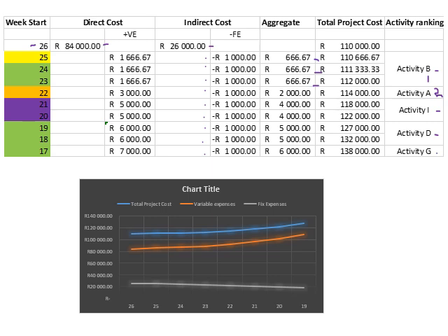You can do it on the project cost as well, to see what the cost implication on that is. It's exactly the same, it gives the same function. You will look for a significant jump in any one of the weeks in what you reduce the items with.